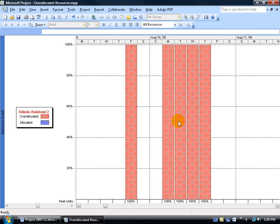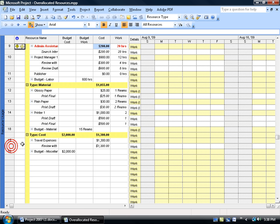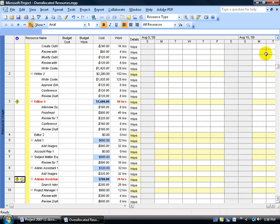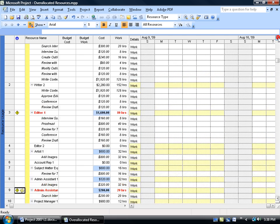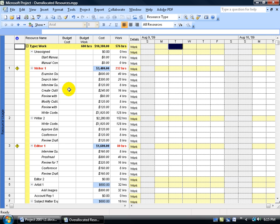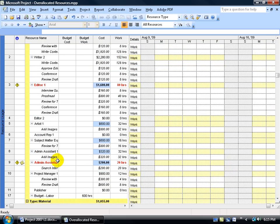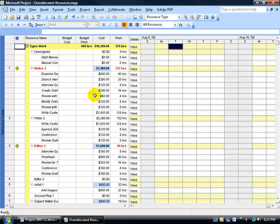The third and final view — my favorite for looking at over-allocated resources — is the Resource Usage view. Right-click on the collapse view bar and go to Resource Usage. As I scroll to the top, any resources in red are over-allocated: Administrative Assistant, Editor, and Writer. In the Resource Usage view, it lists all resources with the tasks they're assigned to underneath. You can tell which resources are over-allocated because they're in red, just like in the Resource Sheet and Resource Graph. The reason this is my best view is because in the right pane, I can get more details — specifically what day and exactly how much work they're over-allocated by.